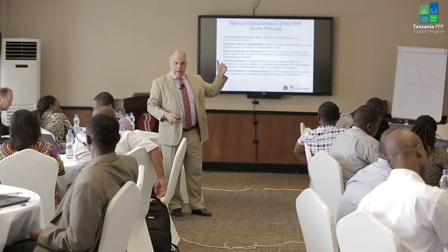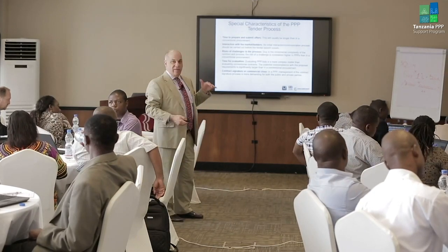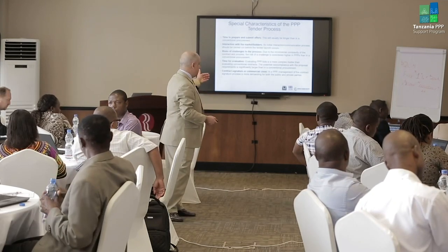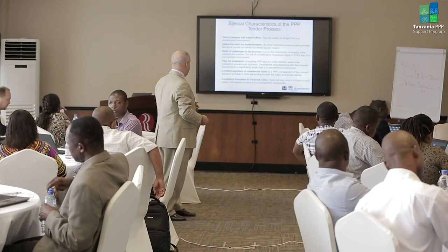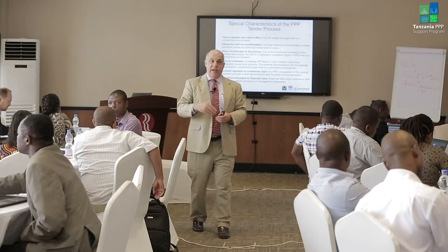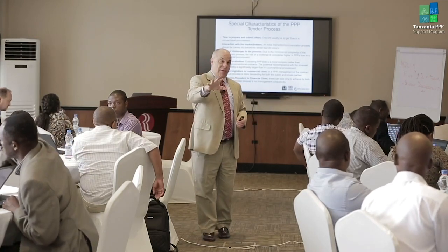So you'll see when we talk in procurement or if we discuss project finance, in public-private partnerships, sometimes you have what we call two closings. We have a commercial close, that's the contract stage. Then we have a financial close. The financial close is when the project's fully funded, when all the money goes in. If you don't have the money, you can't build something. So just to make you aware of that.